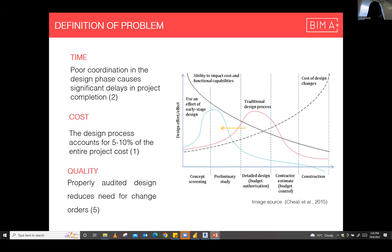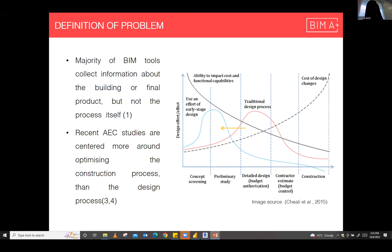The readings I did showed that when it came to time, there's a significant delay caused in project completion when the design phase is not properly managed, and that the design process actually accounts for five to ten percent of the entire project cost. Properly auditing a design would reduce the need for change orders at the construction phase. But in spite of this knowledge and research, most of the BIM tools focus on optimizing progress monitoring and scheduling at the construction phase and neglect the design phase.